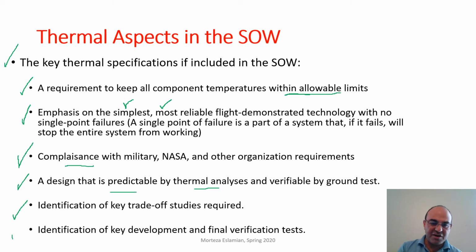Identification of key development and final verification tests. So if a thermal solution has to be developed based on the concept definition phase, then that has to be clearly stated here so that it clarifies the development method for that technology.